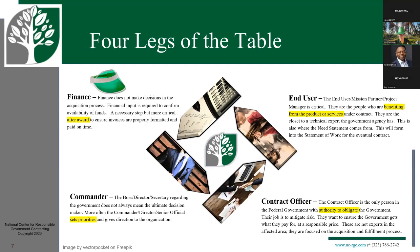Another factor that is in that same law is advance payment or accelerated payments for small businesses. If you are a small business doing work with the federal government, you can request accelerated payment. And if you're a business person, you'll understand what I'm talking about here. The default for all government contracts is net 30. So you submit your invoice, then they have 30 days to pay that invoice. As a small business, you shoot an email to your contracting officer and request accelerated payment, and you get net 10 terms, because you're a small business. That's the only requirement. You're a small business.